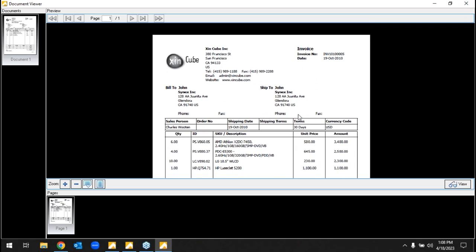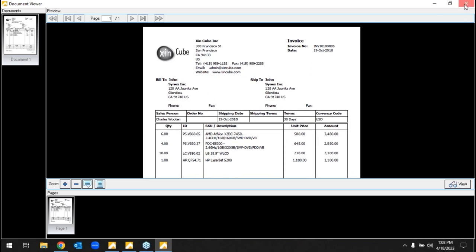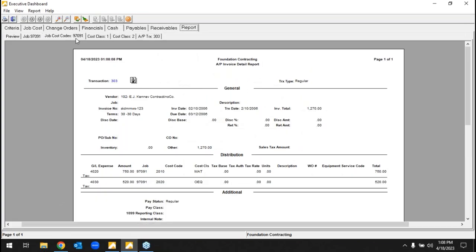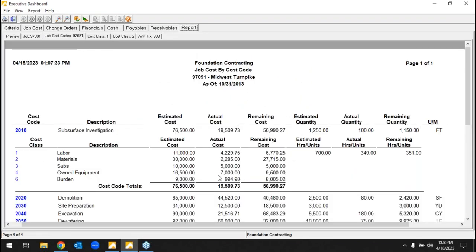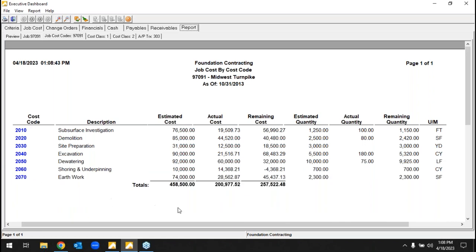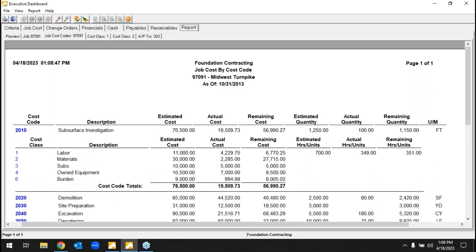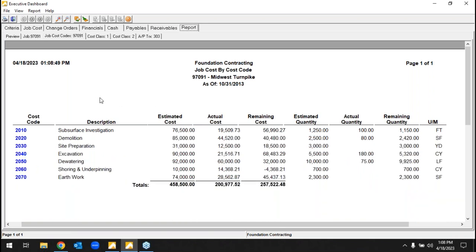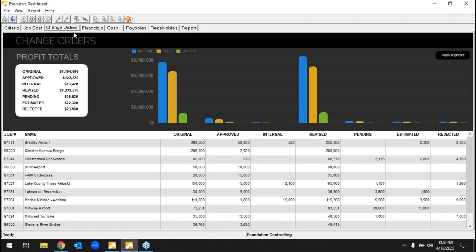I clicked into the material cost and drilled down to the actual invoice associated with it — a lot of people are going paperless in our system. The burden shown is your actual payroll burden: FICA, FUTA, SUTA, workers' comp, fringes. Your cost structure is up to each company — whether they use cost codes, cost types, cost classes, or additional layers of breakdown. There are lots of other job reports available, and we'll take views of change order management as well.